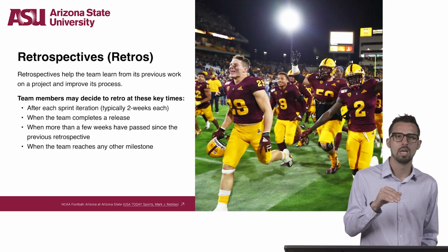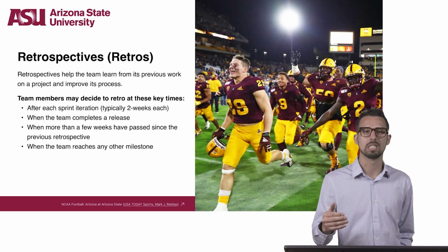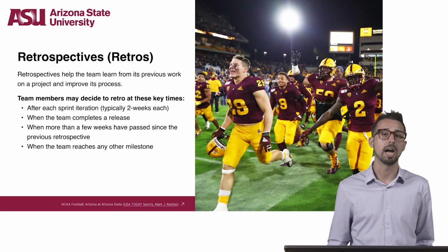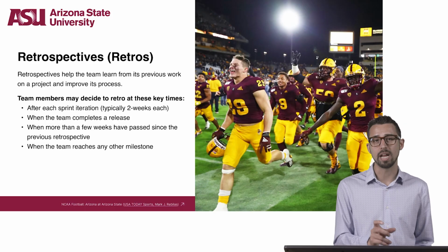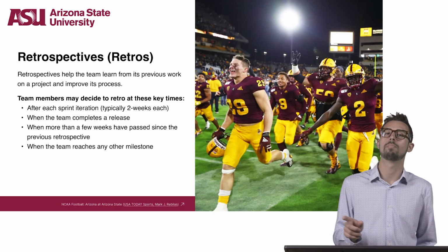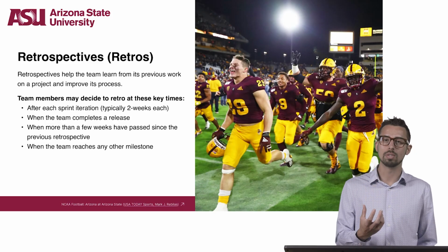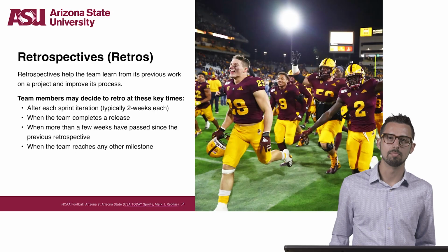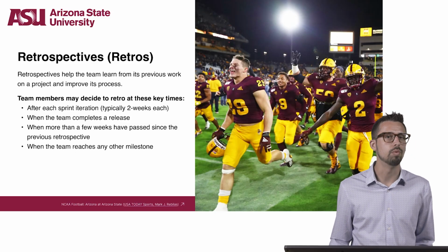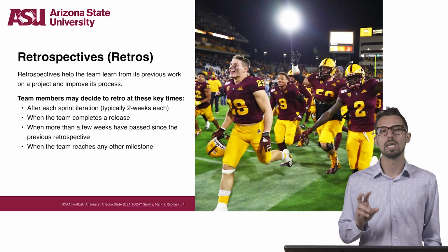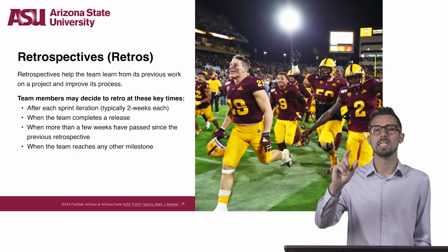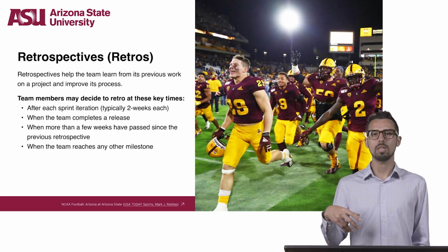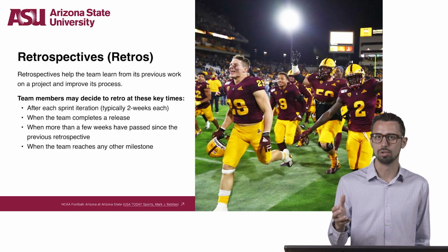Retrospectives or retros help the team learn from its previous work on the project and improve its process. One of the principles behind the Agile Manifesto is, at regular intervals, the team reflects on how to become more effective, then tunes and adjusts its behavior accordingly. Many teams use iterations, particularly 2-week iterations known as sprints, because the iteration prompts a demonstration and a retrospective at the end. However, the team does not need iterations in order to retrospect.